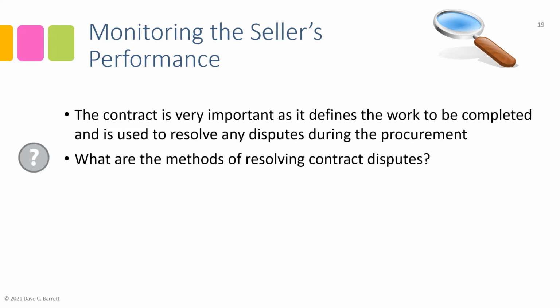based on their assessment of the contract dispute. And finally, the most significant, or I guess the ultimate, would be litigation, where it is actually taken to court. One party is in effect suing the other for breach of contract, and it goes to a court, and a judge decides.